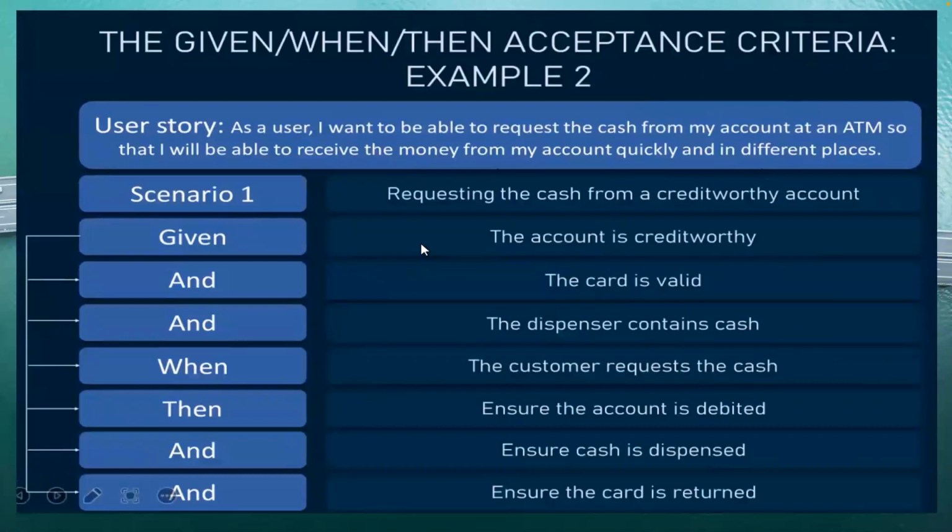Now, you will think it's just pretty straightforward. In fact, I learned on this particular one what complication was, because a whole lot of things came up. So I have this: as an admin, I want the employee to have non-binary. Now, this is the user story. As an admin, because it's the admin that is overseeing that. On our own end, we have the admin portal and the employee portal. So as an admin, I want employee to have non-binary and choose not to disclose as a gender option so that they can have more options to pick from. That was the user story.